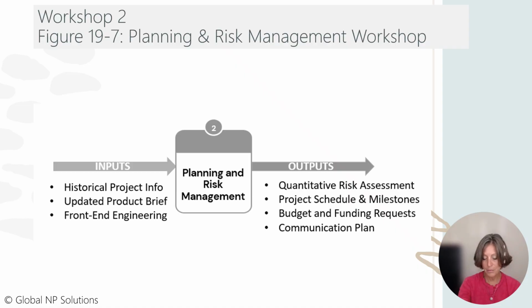Zero-based estimating means that the cross-functional team generates a realistic schedule and budget from the bottom up. In this way, different experience levels and necessary learning are built into the project. Lessons learned from other projects are useful for team members to understand where too much or too little time was incorporated.